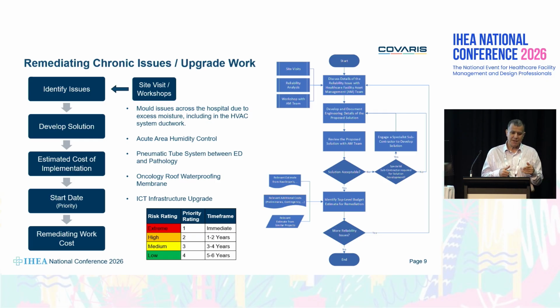So it has to be staged, and then there's all the project management on the hospital side and so on. They add up to a very high figure. In some of these projects, it was over 60%. So the asset replacement is $1 million, then you add 60-70% depending on the project.